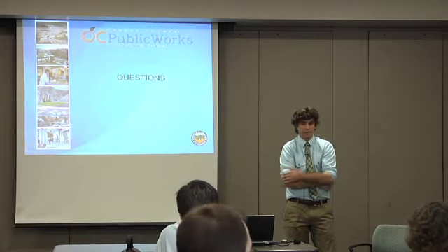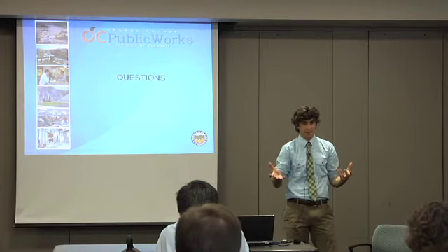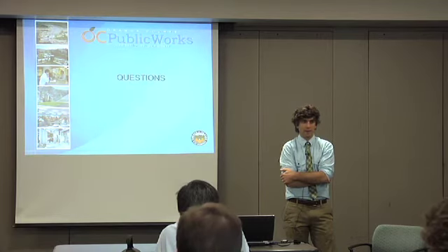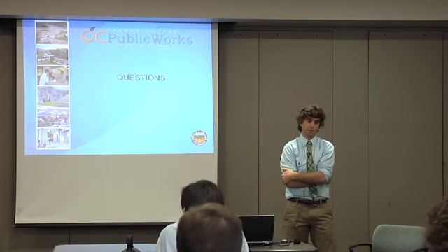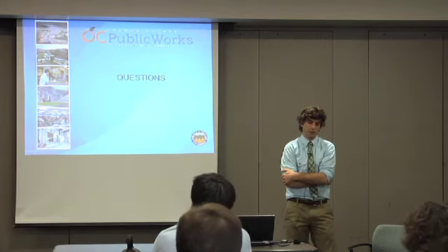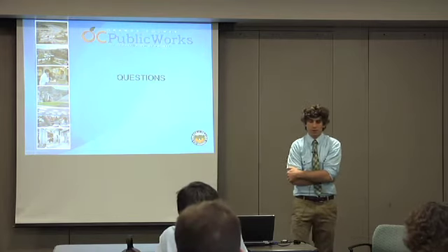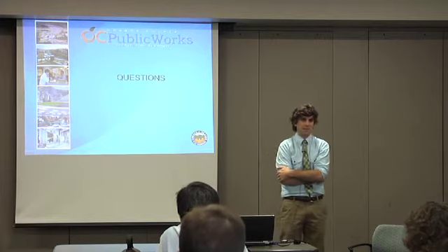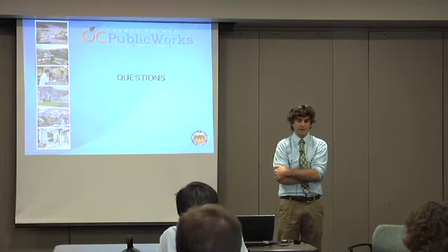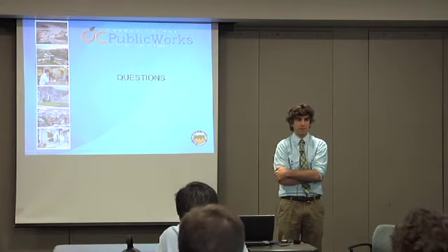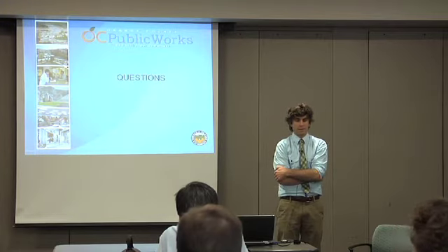And do all these things come together to result in a system that actually retains the design capture volume and drains it in 48 hours? And we'll get into the sizing calculations this afternoon. But you don't need to necessarily know the structural capacity. There are a lot of things in that submittal that you don't need to know, but there are a few things that you need to be very confident of: that they've provided the design capture volume, that they're draining it in the right amount of time, and as a result, they're meeting the sizing requirements.